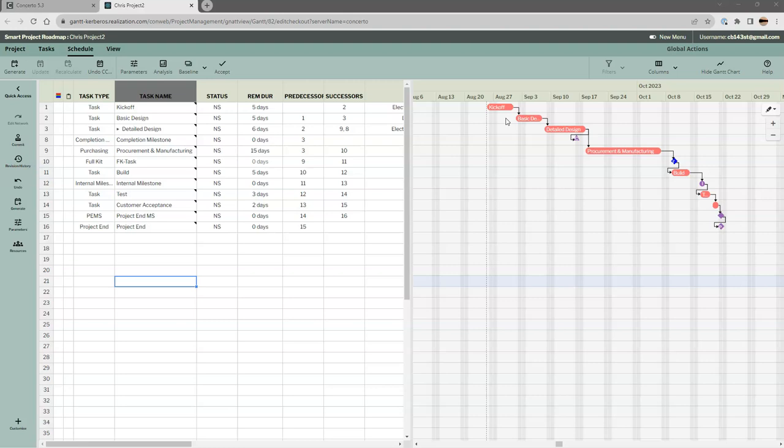So the concept here really is to take some time out of each of these individual tasks, place that at the end of the project, or place maybe some of it in front of this contractual milestone, so that we have some time that we can use if we are running ahead or running behind. Okay.